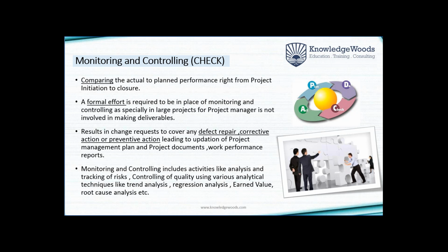So a formal effort is required to be in place for monitoring and controlling. This is not an informal process where whenever you want, you just have a look. There is a formal process, especially in large projects where the project manager himself may not be involved in making the deliverables, and he may not be omnipresent. So the data has to come out of the execution. It has to be compared with the baselines, so that the variance can be analyzed.